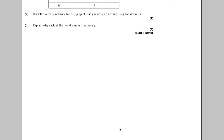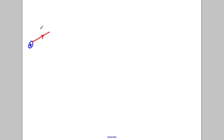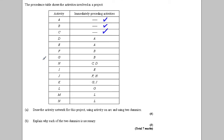We always start off at our source node, which we label zero. Now, looking at the table, A, B and C depend on nothing. So A, B and C can come out of this node. I'm going to put A there, B there, and lastly C there.